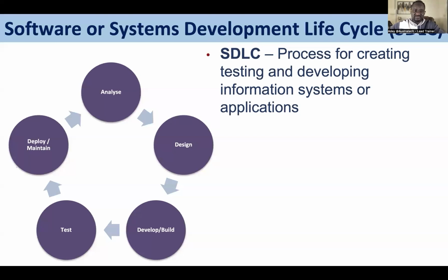The analysis is to really look at what we call requirements. When the business says we want to deliver a particular system or a solution or a service, you want to be clear what their requirements would be. What are the needs you have in this business? So as part of this, you have a role type called a business analyst who does the work of requirement elicitation and gathering, and would stitch together on behalf of the sponsor or the business lead what we call a business requirements document.